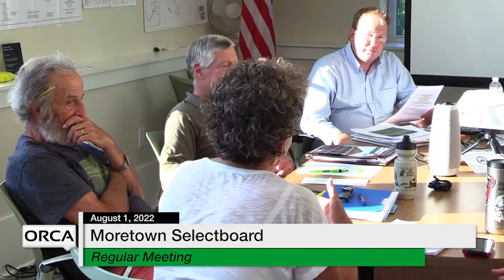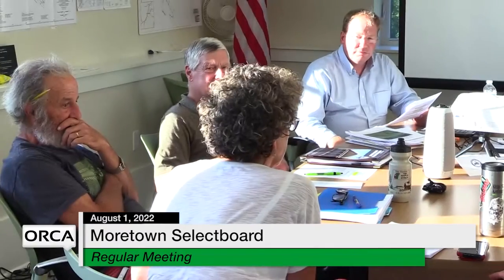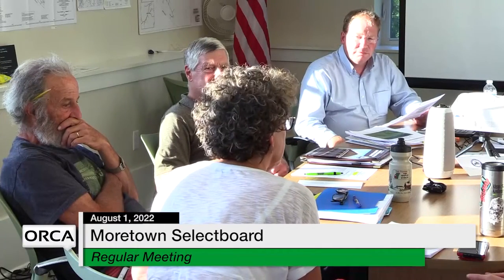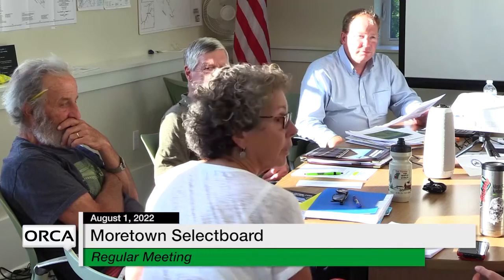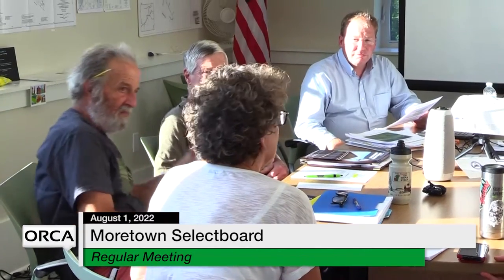There are a lot of state requirements in terms of what we have to do in order to be a childcare center, including a public water system, which was $150,000, a new wastewater system, which is going to go in this fall, and lots of other licenses.